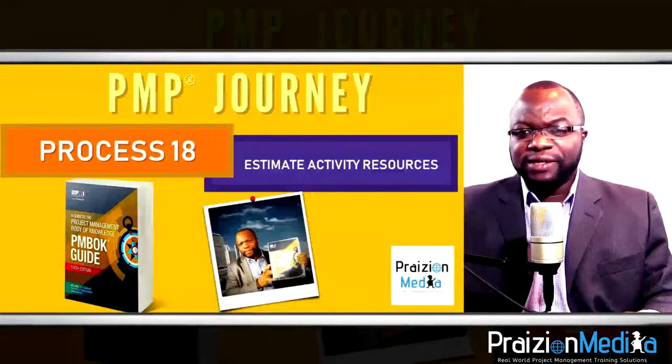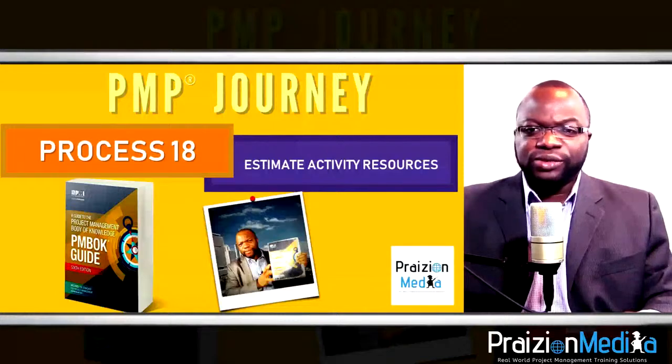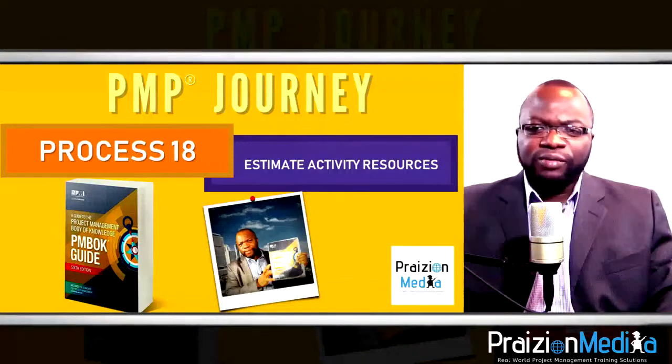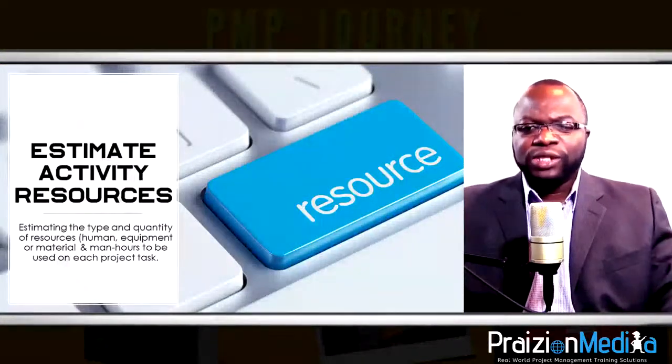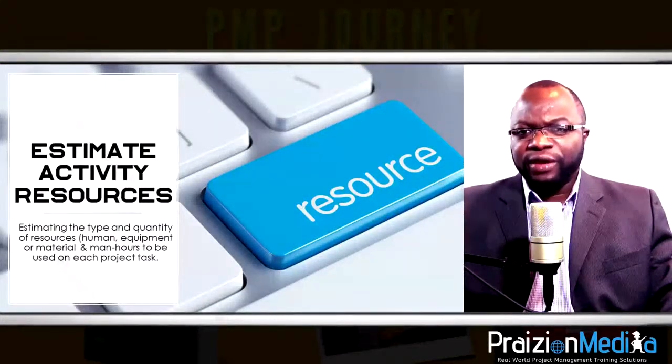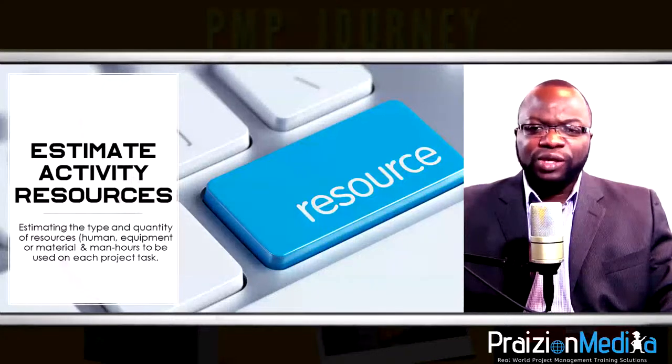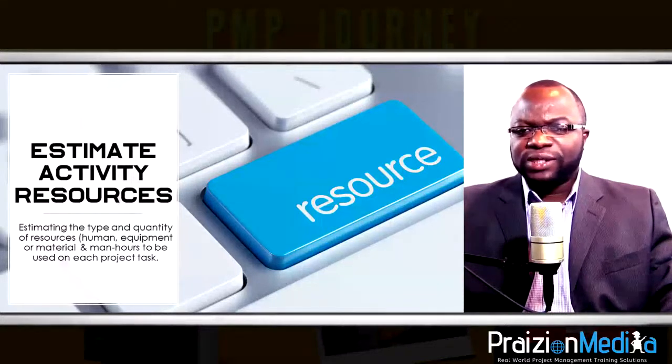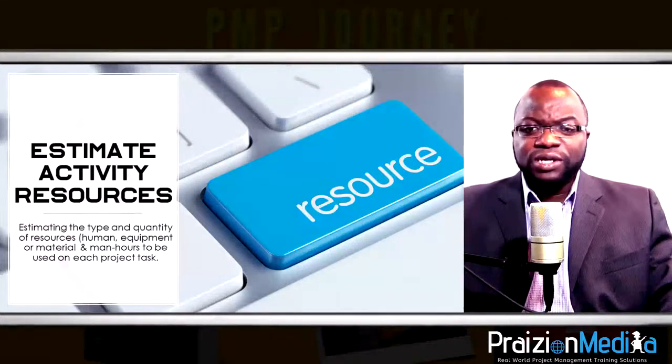Process 18, estimate activity resources. In this process, this is where you ask the question, what kind of effort are we talking about? Okay, that will take 50 hours of effort. How many people do you think you need to do that? What skill level are you looking for to be able to do that within that time period?